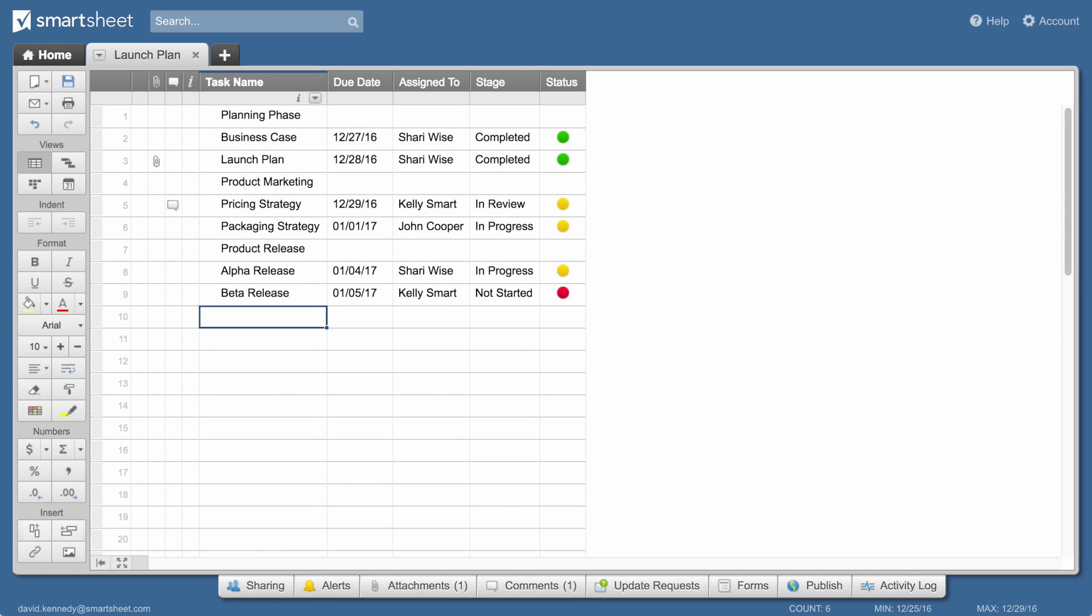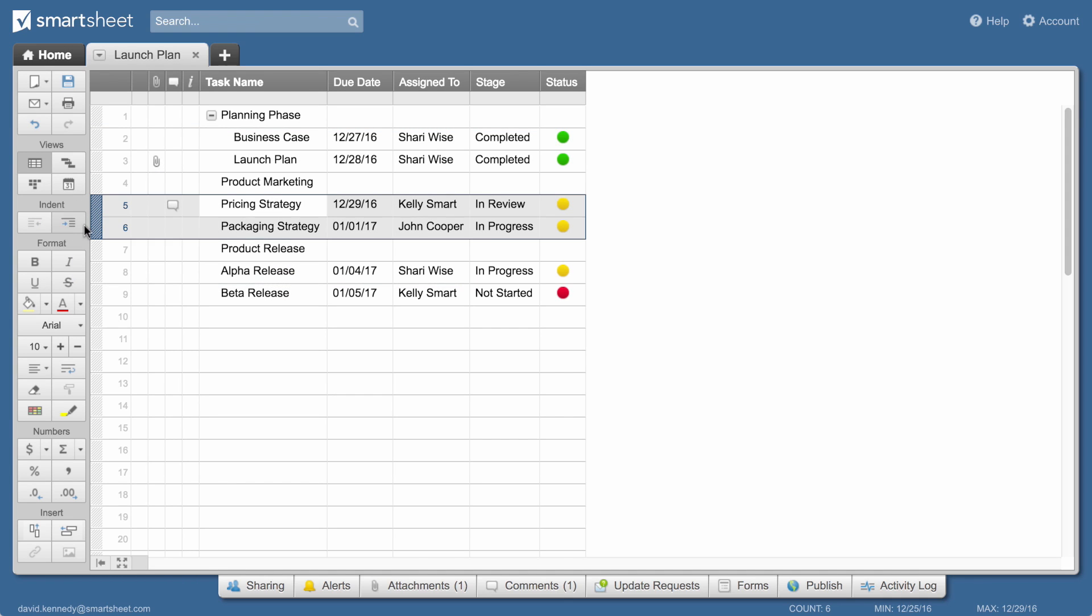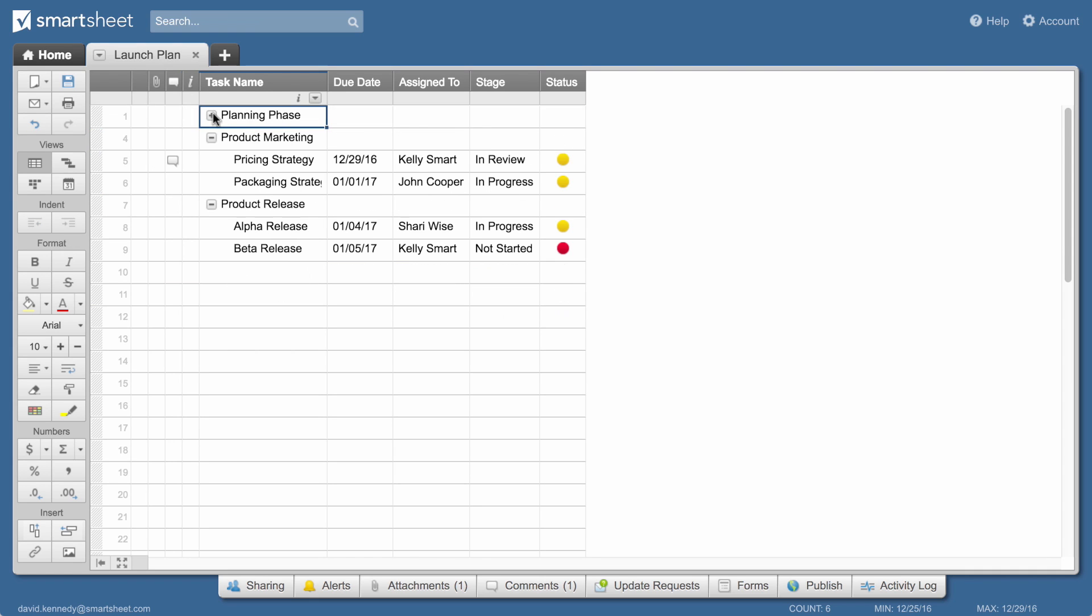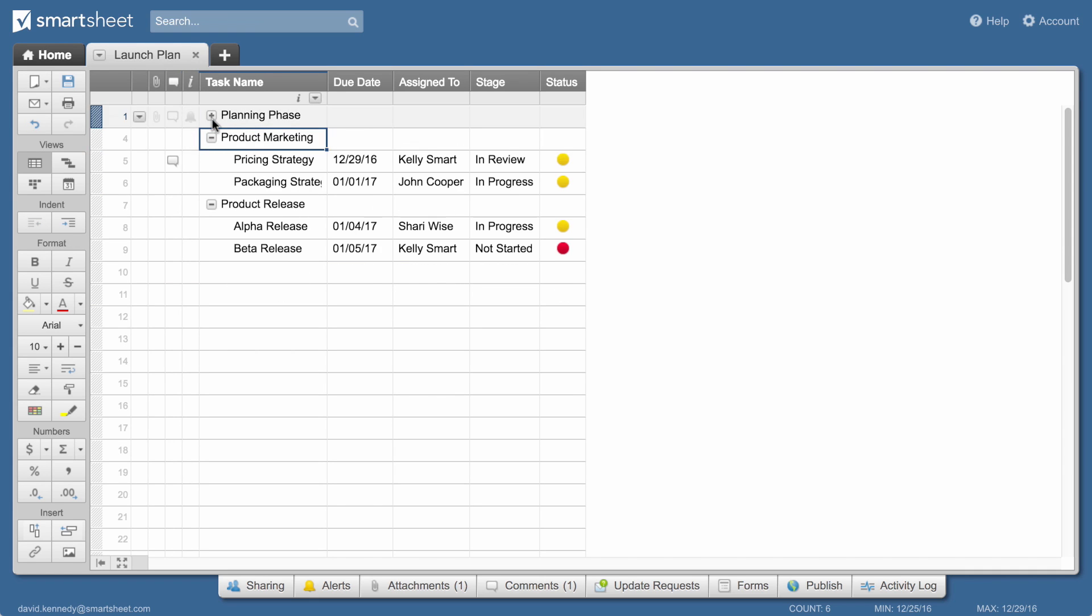For this project, it will be helpful to group related tasks. So we'll select the rows below the row we want to use as the header and click the indent button. Now you can collapse your rows for an overview or expand to view detail.